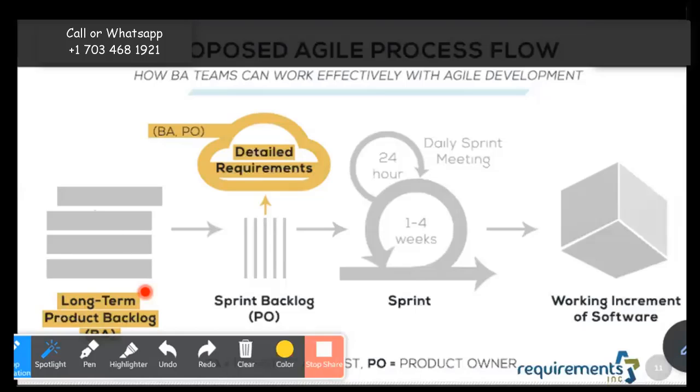Now, the development team looks at this list and says, okay, you know what? How can we best achieve this within the team size that we have and the timeline of the project? Should we go with the 1 week sprint or 2 week sprint, or how many weeks sprint? That's where the development team and the organization together find out, okay, for our organization, we want to make 2 week sprints. What does that mean? So that means every 2 weeks, you do this cycle.